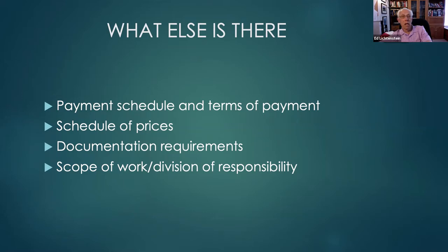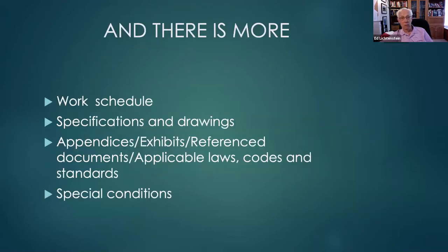If I was going to approve your plans or a model that you gave me, and I don't approve it by the time I'm supposed to, that can be a problem. So that scope of work, division of responsibilities, should be very clear, especially if you're doing a contract that has a lot of moving parts. Because there can easily be misunderstandings as to who's supposed to do what, when, and where.